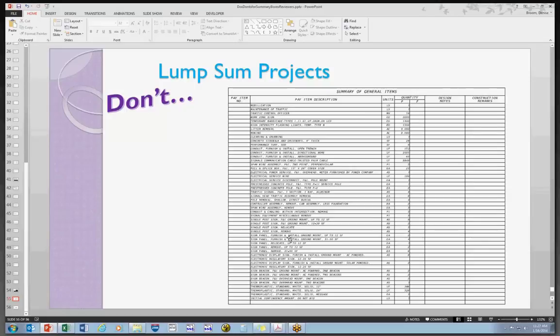There is a summary box for each of these items, and I'm even seeing signing and pavement marking in here. Signing and pavement marking should be on a tab sheet in that component. Sign beacon, yeah. And any of the roadway stuff, all of those roadway components or roadway summary boxes that I just went through, that's what you should be seeing on lump sum projects, just no totals.